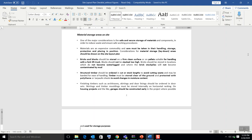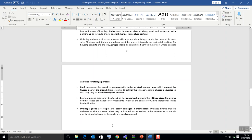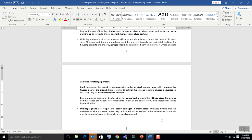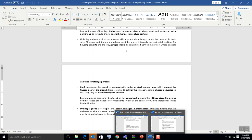Scaffolding and similar leased materials are returned once the project is completed, so they must be stored carefully. Some machinery also cannot be disposed of and must be handed back to the supplier or head office stores. Special attention should be paid to storage of such items, and separate designated places should be allocated for them on site.